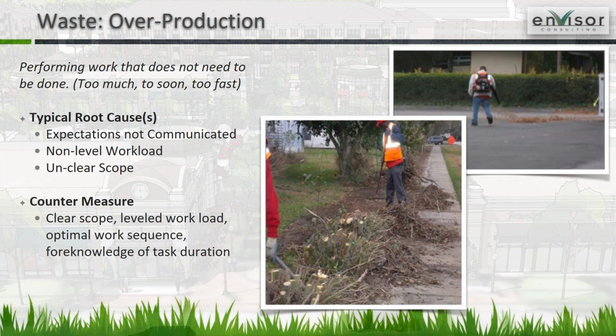Now, the guy worked hard. He was trying to do a great job, but it's waste because it's out of scope. It's non-value add. And in that case, we had been visiting that job site once a week for 5 years, spending an hour and a half blowing off the parking lot that the customer did not care about. So it's overproduction. It's doing work that just doesn't need to be done.